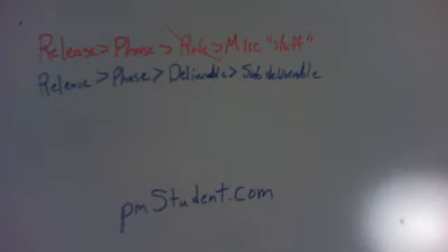But definitely in the work breakdown structure, if you do it by role, then you start to think in terms of what type of work does this person do, rather than what needs to be delivered to satisfy the requirements on the project.